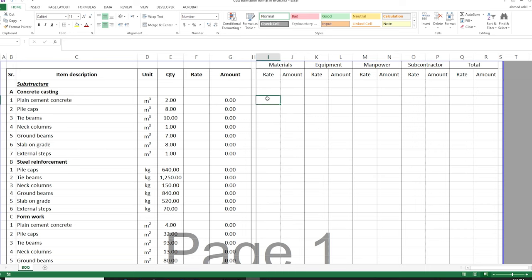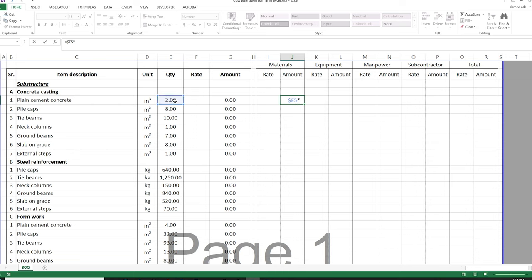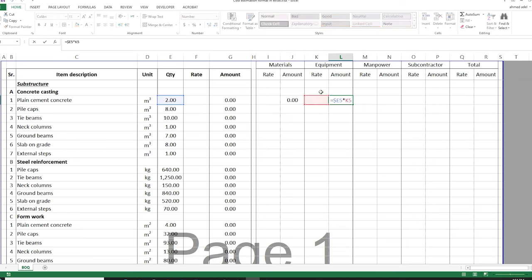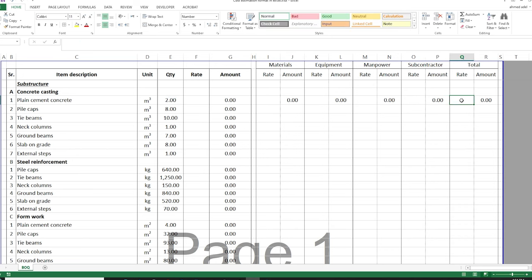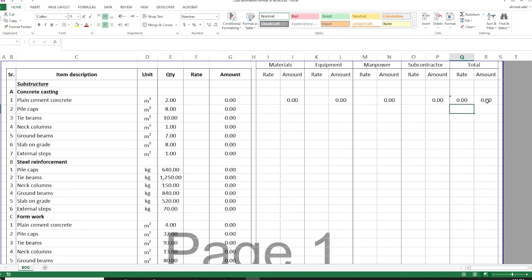I'll start with the material. Whatever rate I put here will be for the material, and the amount will be the material rate multiplied by the quantity. So the amount equals dollar E5 multiplied by the material rate here. If I copy this formula across, I am multiplying the rate of the equipment by the quantity — the quantity column is fixed because of the dollar sign next to column E. I'll copy this to manpower and subcontractor as well. The total rate equals material rate plus equipment rate plus manpower rate plus subcontractor rate, and the total amount equals total rate multiplied by quantity.